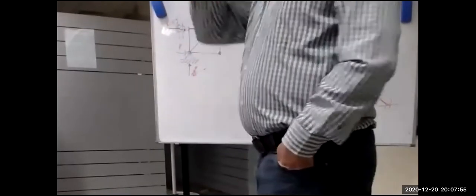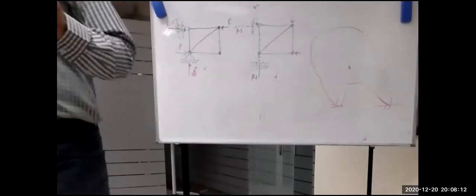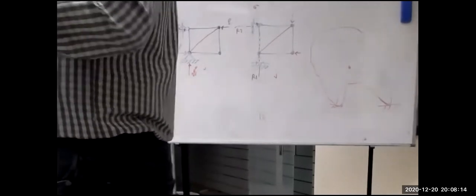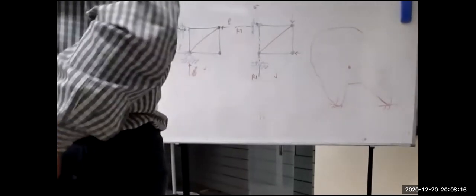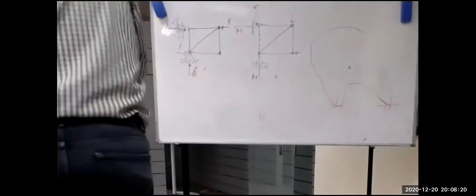After 3 months. And this building, in your program, will finish after 5 months. You have how many months difference now? 2 months. What do you have to do now? In particular terminology, acceleration. You are going to accelerate, crashing. This acceleration crashing will cost you a lot.